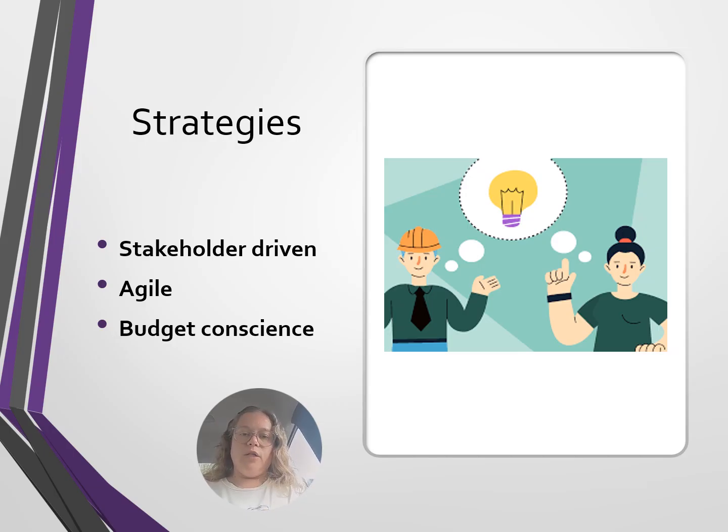Implementing an electronic PHQ-9 at the project site requires strategies that address both technical integration and long-term sustainability. One strategy is stakeholder-driven co-design. A multidisciplinary implementation team will be formed including clinicians, IT staff, administrators, and patients to align technical capabilities with clinical workflows. We will use Agile to refine the PHQ-9 interface. We will embed feedback mechanisms to identify any workflow issues.